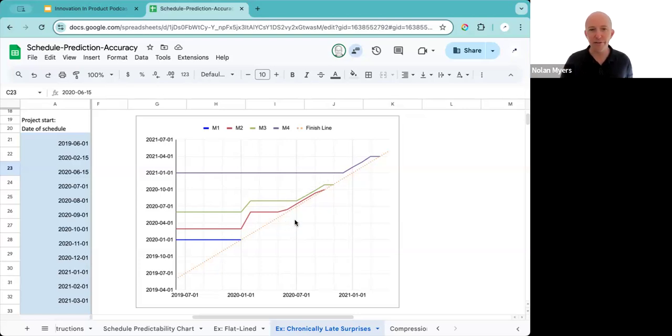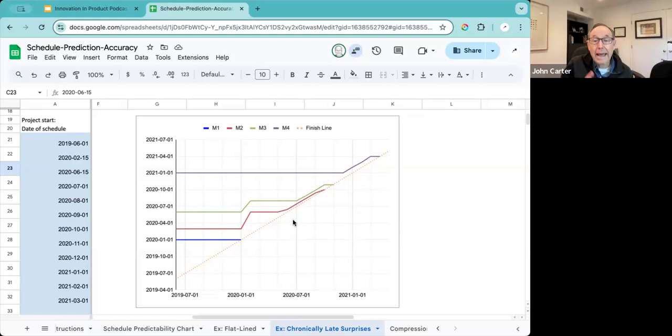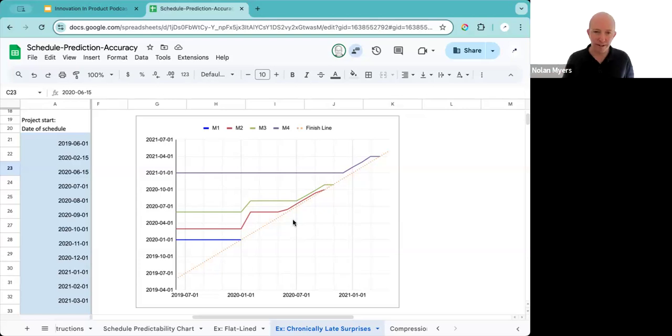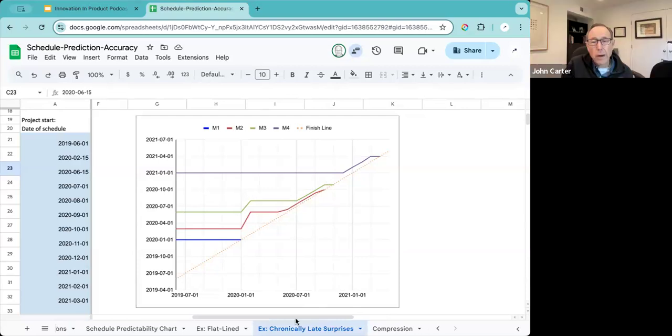This is representative of a period of day-for-day slip, right? Correct. Every day you come back and you push the schedule out one more day. And it's like, well, I'll have it tomorrow. I'll have it tomorrow. I'll have it tomorrow. That's a common red flag that many managers will have experienced. But this chart really helps show what's happening visually and gives them the data to push back. Right.